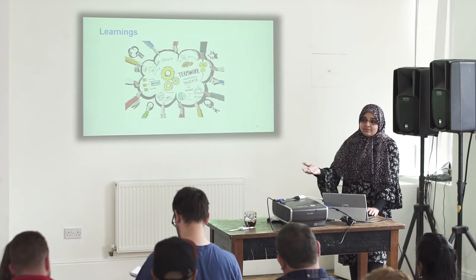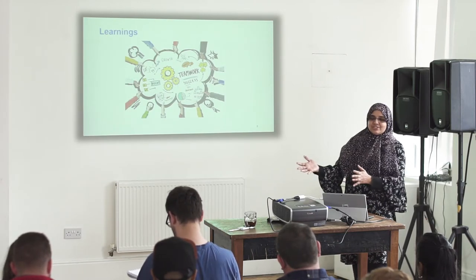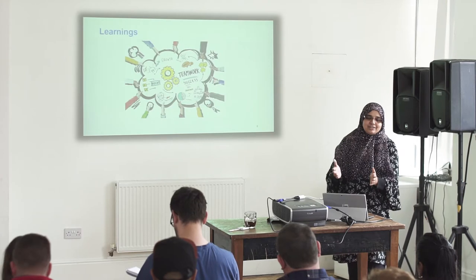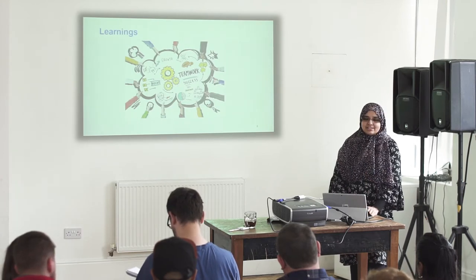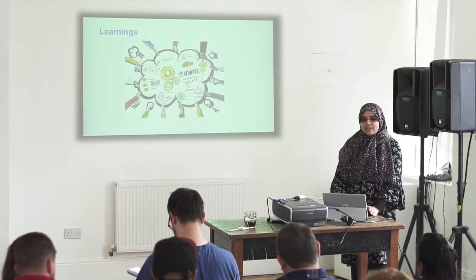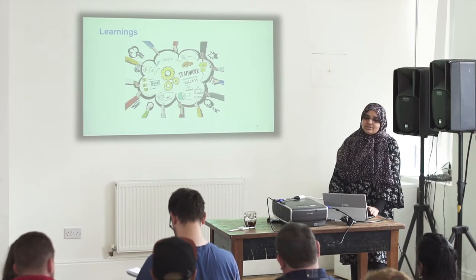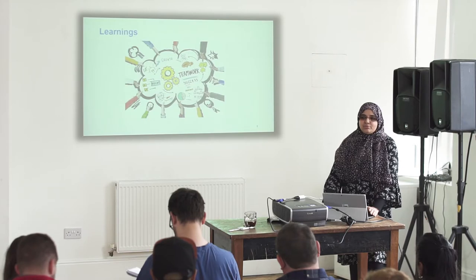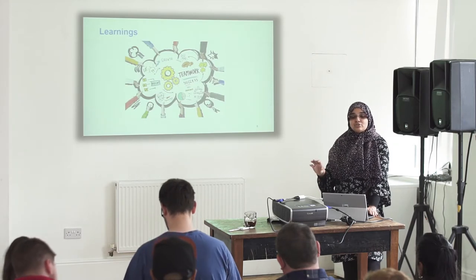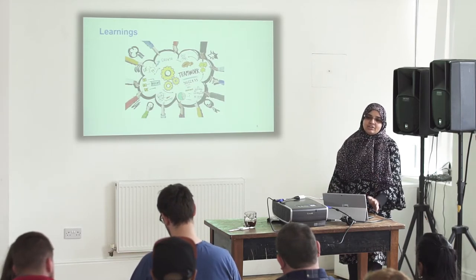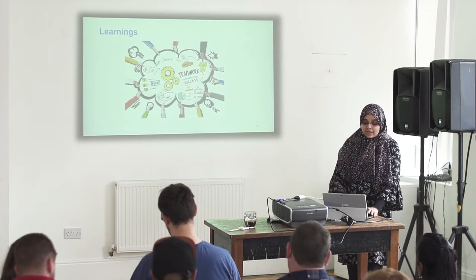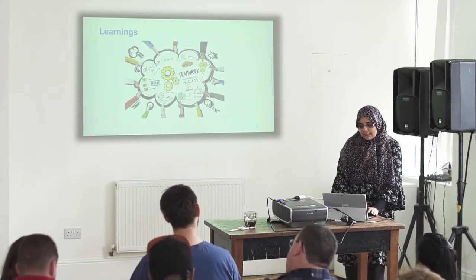Because, I don't remember exactly, there was a 3 weeks testing that she decided she thought it needed, but then in 3 days. So if you have to cover 3 weeks testing in 3 days, you should be able to identify what those 3 days worth of testing are which will give me enough quality so that my product will at least not fail. You don't have severity one or severity two issues, so you need to identify what those risks are.